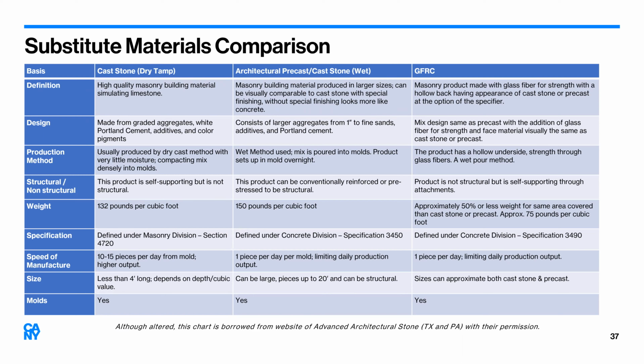Well, I think also because of LPC's rules, more and more people are having to use terracotta below the 6th floor. But then also, you have decorative terracotta, and the decorative terracotta definitely takes a lot more time than if you were producing ashlar units that could be extruded. And all three of the manufacturers will start the replication process and the color matching at the same time. So you don't have to wait for your unit to come out of the kiln to start your glaze matching. They'll run them simultaneously.